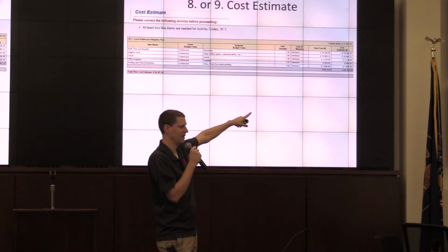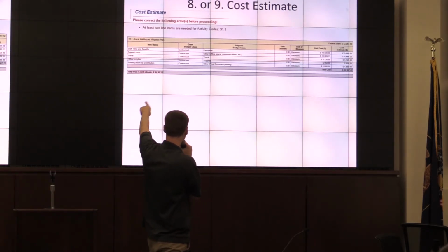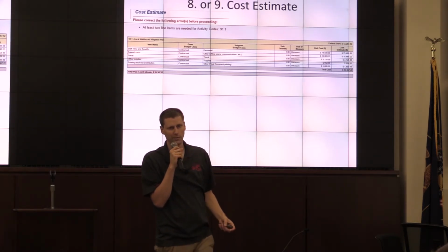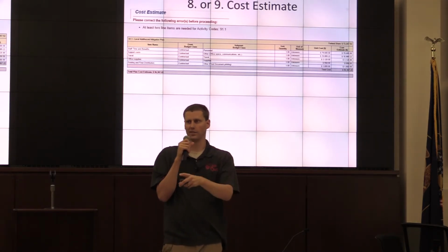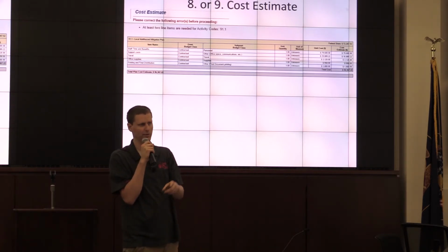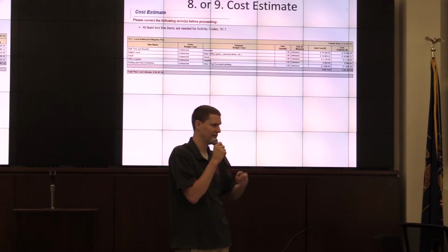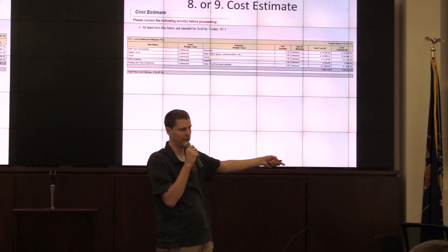So if you had, say, travel for $3,000, you say this many miles at this cost equals $3,000. That's where you have to justify it. Or we'd hire a contractor for this much, you know, they get paid this much.